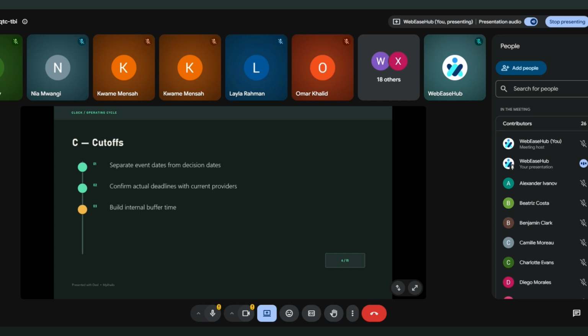Before the boundary, the organization is operating in the standard path. After the boundary, the organization is either declining the request, deferring it to the next cycle, or handling it through a controlled exception path. For each cutoff, I recommend defining 4 things. First, what must be complete? For example, approved variable pay changes have been submitted with supporting documentation.